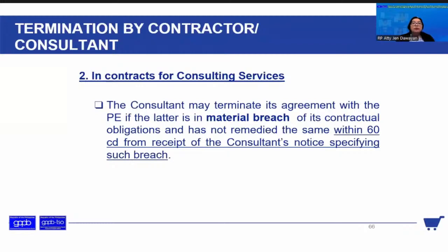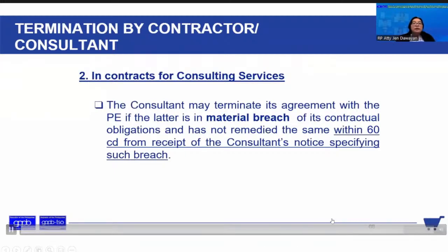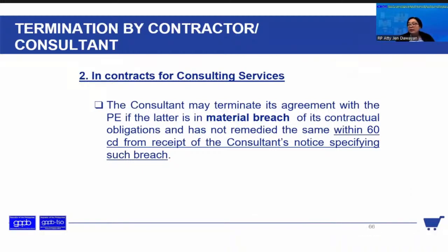So what about consulting services? So the consultant may terminate its agreement with the procuring entity if the latter is in material breach of its contractual obligations and has not remedied the same within 60 days from the receipt of the consultant's notice specifying yung breach na yan.